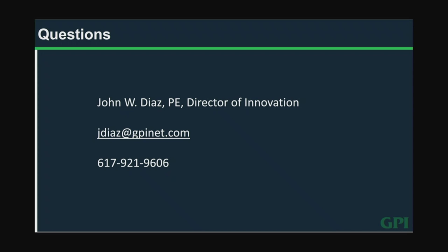Yeah, I mean, obviously, before every flight, we go through a process of checking waivers, doing all that, and then the very last thing is a site assessment the day of the flight. Obviously, if it's windy or rainy or snowy, we're not going to put the drone up in the air. I mean, it's like with any aircraft, you got to do an assessment of the conditions. So that is, I will say, the one drawback: schedules can sometimes get impacted, because there's just days you can't fly.